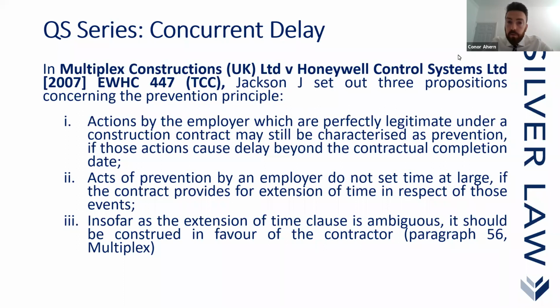But this is in 2007. Standard forms were being updated at that time, and have continued to be updated. So as I said, it's very rare now that events would happen on site which are not catered for under the extension of time provisions. The final ground here is that insofar as the extension of time clause is ambiguous, it should be construed in favor of the contractor. So, an interesting proposition put forward by Justice Jackson.